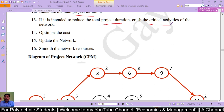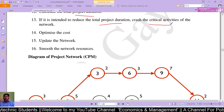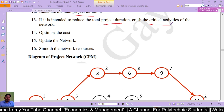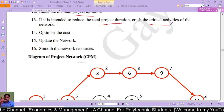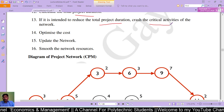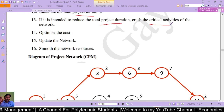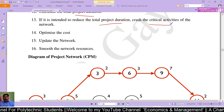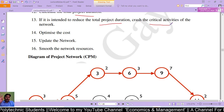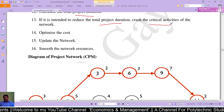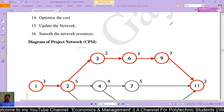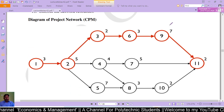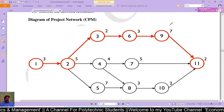Crashing is achieved by devoting more resources — whether human resources or material resources — to crash critical activities of the network, optimize the cost of that network, and smooth network resources. This is done with a diagram on which we have indicated the critical path.